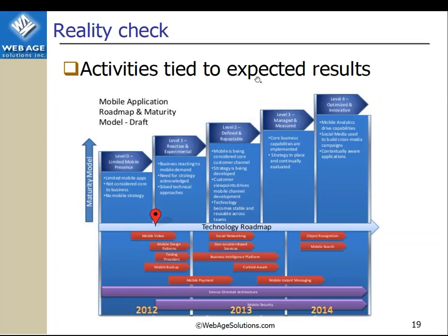And obviously when you have that work going on, you hit a transition point. When you hit a transition point, you should be stopping to recheck your original plan to see: is it working? Are we getting the results? So in this one, tie it back to the expected results. So if you can see, perhaps this is like the big picture roadmap, and I'm going to be looking at discrete points. Now arguably, if I see these things finishing, we could say we're here right now, but when I'm here, I really want to stop and do a health check.